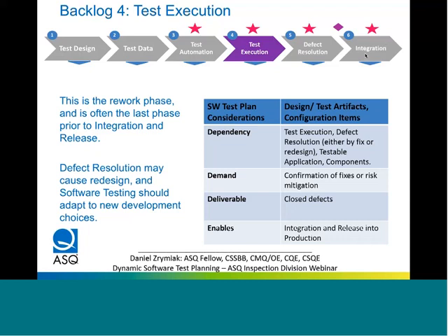So as far as project management, now that I've segmented the testing project into six distinct sub-projects, how does this manage? If we look back to the traditional waterfall, the starting point is to wait until one phase is completed before starting the next, the finish-to-start dependency.